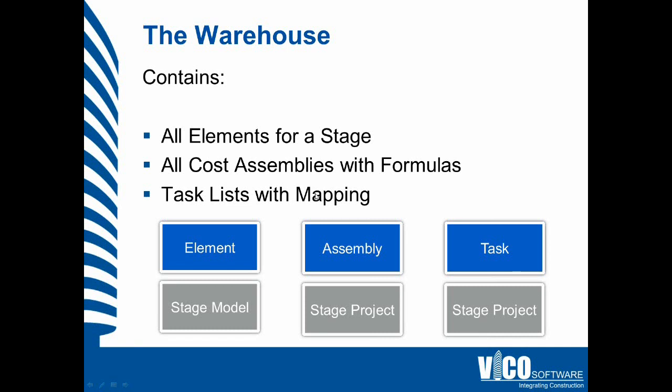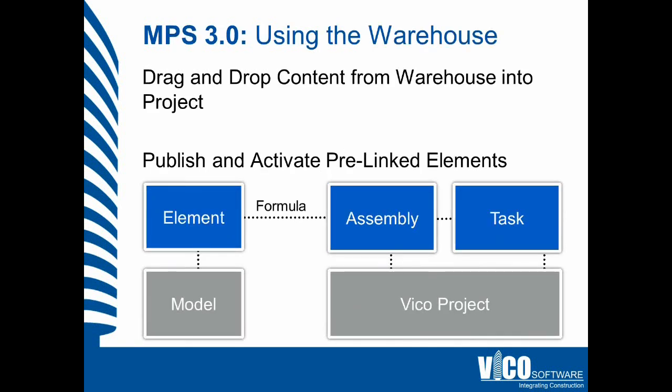There's also a task list with mapping. When you know which cost assemblies, components, and quantities you're going to get out of your building information model, you can predefine the list of tasks that can derive their quantities from that data set. This means elements will be named correctly, so there's no surprise when you get to the estimating stage and need to find out which model element needs to be linked to which cost estimating component in the assembly.